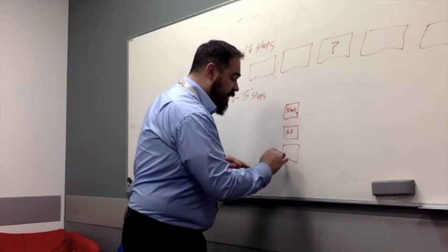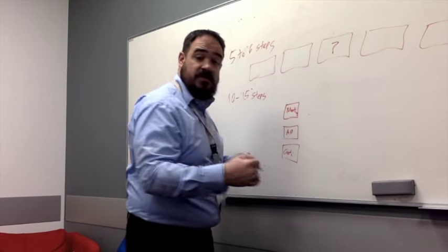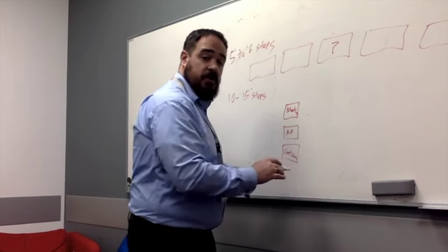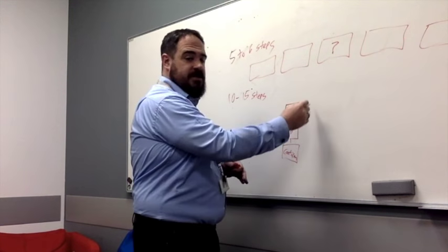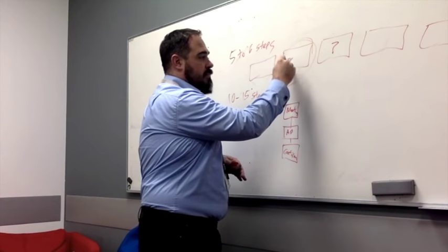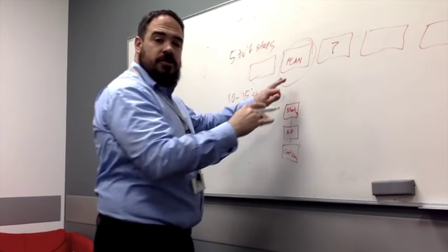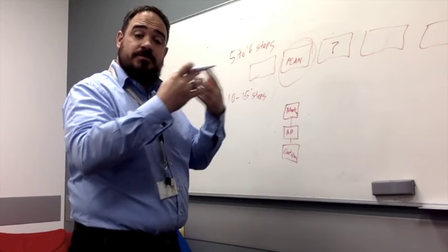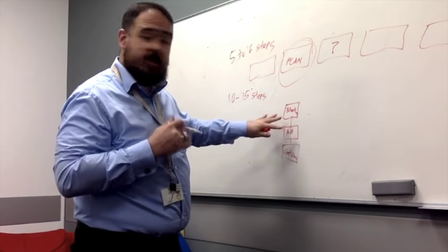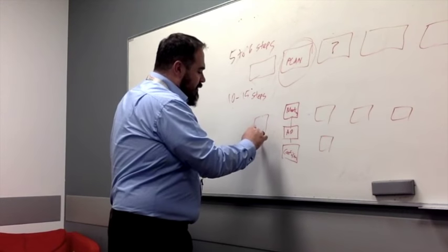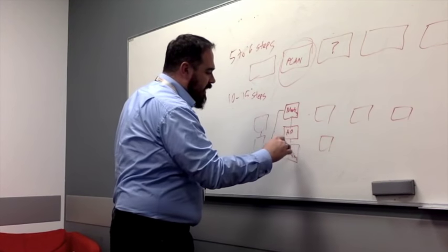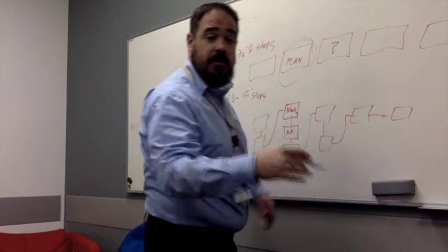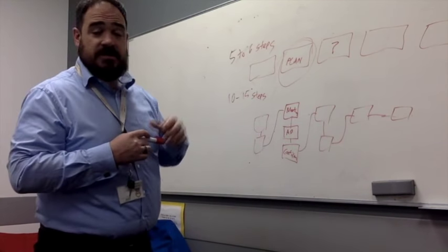Then we might do something like confirm the resources that are needed, the people, the time, the cost, the effort involved, so we make sure that we're going to be successful in our plan. And these 3 steps here will encompass this one step of planning. Okay? And you go through that, and this is why the actors are so important. Who is involved in this planning step? That's the people that we want to seek their feedback from. And you keep going. So we've got now this single flow of how all of these steps come together to ultimately deliver that request that our customer has asked us for.